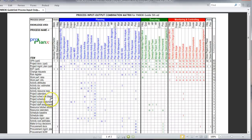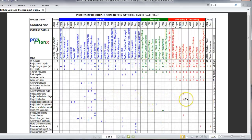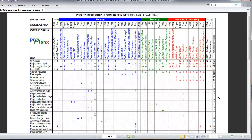Let's start with one example: Project schedule. Go across the row. You will notice the O. In that particular column, you will notice develop schedule. So project schedule is an output of develop schedule. Going across, you see I for input. It's an input to estimate cost, determine budget, plan procurement management, and control schedule, for a total of five processes. So five processes are affected by this project schedule. That is what this number five here represents.